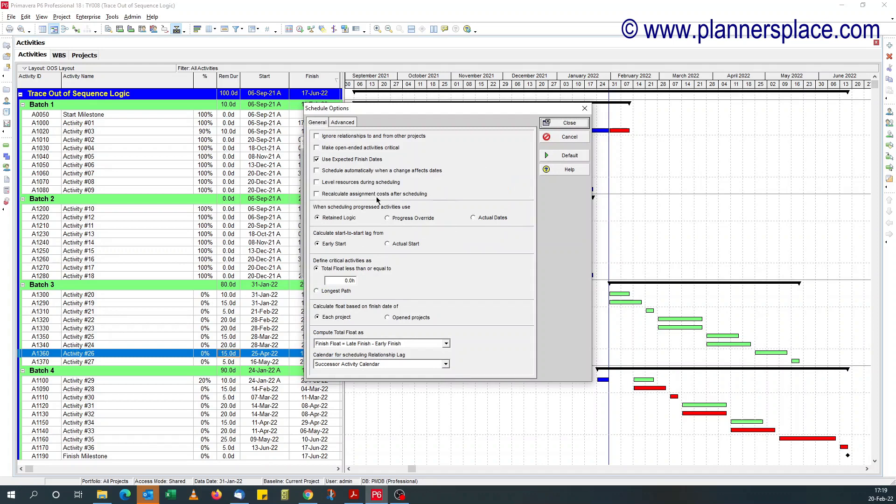You see when scheduling progress activities, there are three options: retain logic, progress override, or actual date.